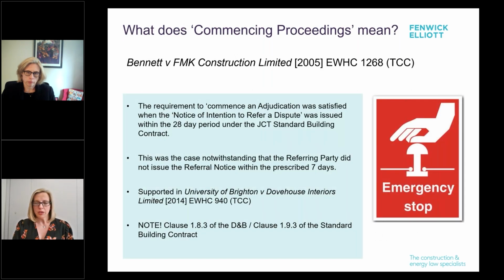So now we know that time bars will bite under the JCT. We've got to make sure that we don't fall foul of them. To that end, what do we mean by commencing proceedings? In Bennett and FMK Construction, the judge held that the requirement to commence proceedings had been satisfied when a valid notice of an intention to refer a dispute to adjudication had been issued within the 28 days. This was notwithstanding that no referral was issued within the 7 days thereafter.